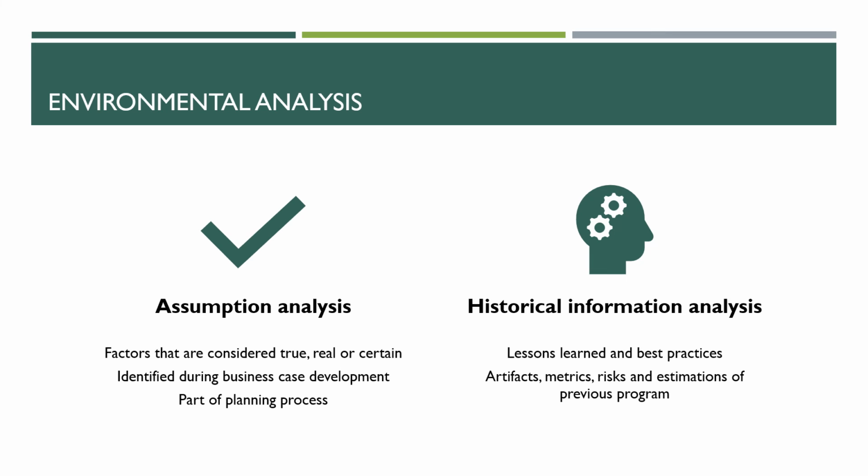The final two environmental analyses are assumption analysis and historical information analysis. Assumptions are factors that are considered to be true, real, or certain. These are identified during business case development and are part of the planning process. When assumptions go wrong, the risk increases. So assumptions are a very important part of risk assessment.